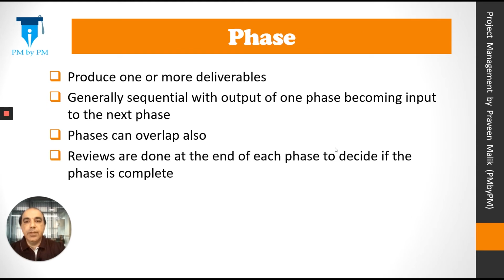So what is a project phase? A project phase is a span of time which culminates into one or more deliverables. Generally, the output of the first phase becomes the input to the second phase. Generally, the phases are sequential, but they can overlap also. At the end of the phase, we do a review to ascertain whether the phase is complete or not complete.